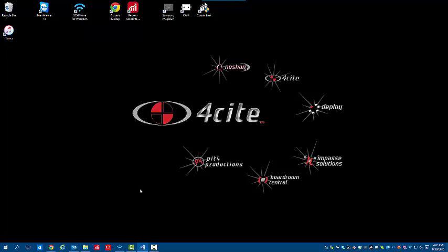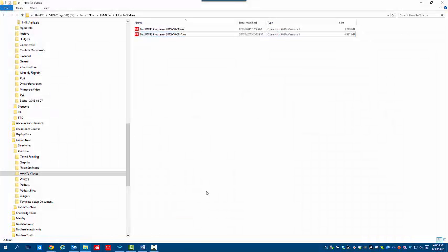So we're going to go into File Explorer and navigate our way to the file that's causing us the problems. Here I've just set up a test POBS program for you to get an understanding of the process and what's happening, and you can see that it's 6,921 kilobytes, or nearly 7 meg. And that's a bit unusual because Primavera is pretty efficient at maintaining data size and its records and the way it compresses its information. So this tells me that I've got a problem with my file. So what do I do about that? Well, what I'm going to first do is alter the extension name from an XER to a text file, and I'm going to approve that.